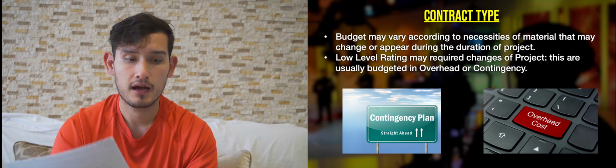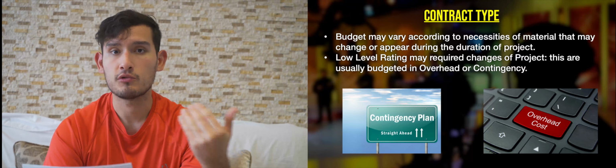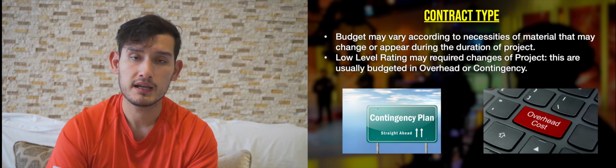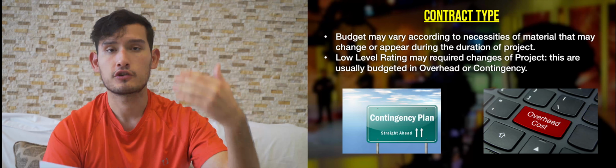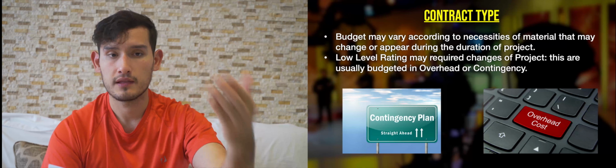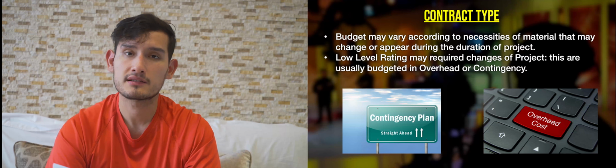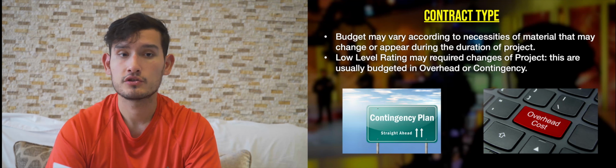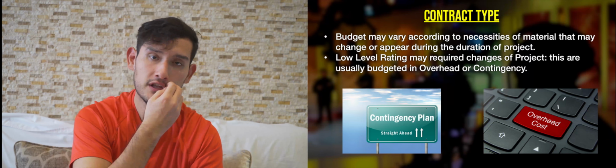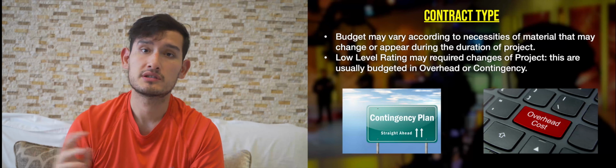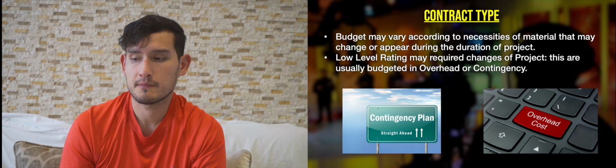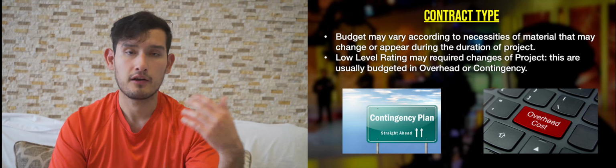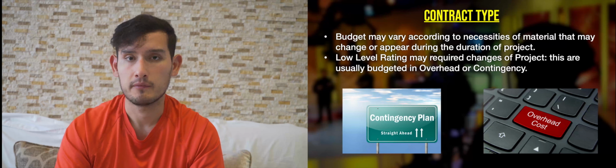So you should send a formal change request to the stakeholders asking for money for the construction and the build of these games. Usually this cost comes from the overhead and from the contingency, because when you plan from the beginning you think that those games are just enough and it's going to get good quality content, but sometimes they need to change and you may need to hire more people to construct a new game.